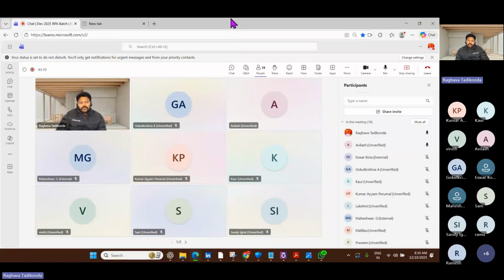How is it possible? How is it happening, guys? Because we are following agile methodology. What does it mean? The total project we divide into small chunks, small parts. For the first part, we put some timeline: okay, in 3 months we need to complete the first version of WhatsApp. In the second version, we will add the status option, group audio call, group video call. In the third version, we will launch the WhatsApp payment option. In the fifth launch, we will add the WhatsApp business option. In the sixth, we can add catalogs, brochures. We can make some business.